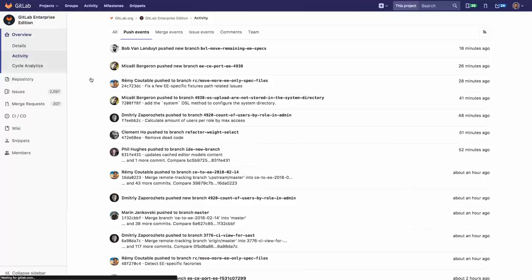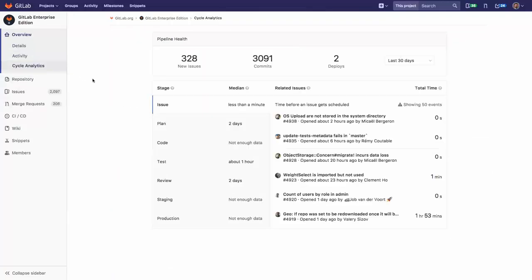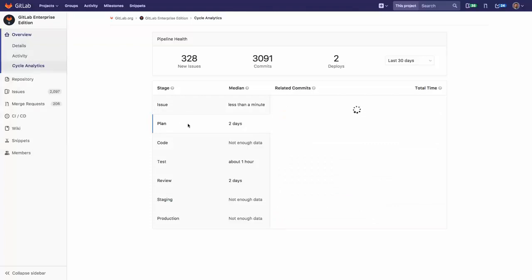Cycle analytics. I mentioned at the beginning of our conversation that cycle time is one of our most crucial metrics. How quickly can we deliver value? Once again, working software to our users. And in that speed, not only are we tracking the speed itself, but we're tracking the quality. So with cycle analytics, we can see per stage as part of our, once again, idea to production type workflow, our overall high level SDLC and DevOps flow, how long it is taking us to go through different aspects of that flow? And all this information we would filter pertaining to a specific interest in different metrics.